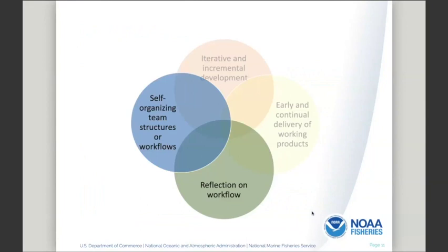So these ideas that are coming from lean manufacturing are really focusing on this part of the Agile. It is the importance of thinking about the group dynamics, like flat hierarchies, continual learning, and really high intentional communication across the team. So what does that mean when I say that? That means every single day the team is checking in. How's it going? What are you working on? What are the issues? That level of communication. It's not a really long meeting. It might be really fast, but this importance of the team having one-on-one, the human connection, is super important.